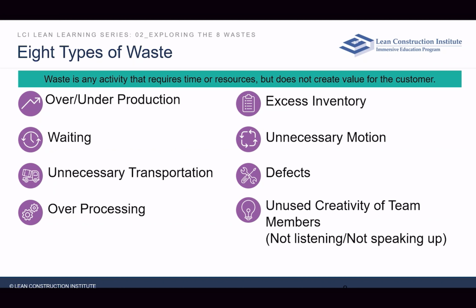So if I give you a work product, let's say I'm putting together an invoice package and I hand it to our employee that does invoices and puts that together for our clients, and I hand them a terrible piece of junk product that's going to take them extra time to fix, did I do something that was valuable to that person? No, I'm wasting their time. So there you go. There's our first talk about waste.